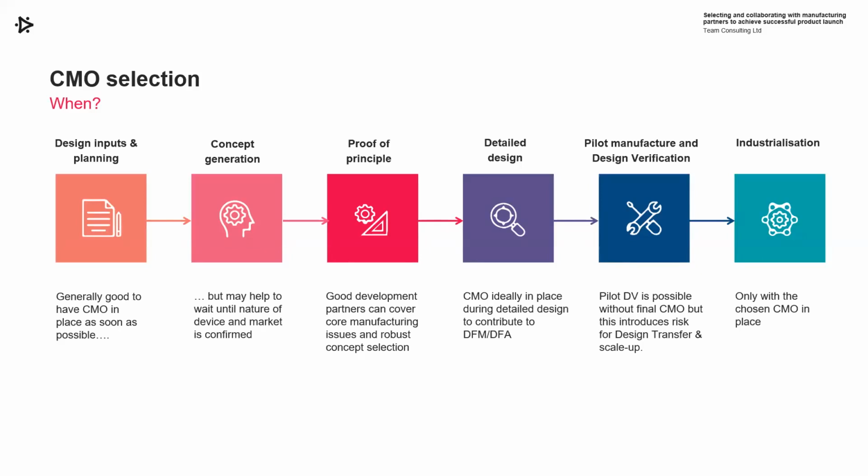Pilot design verification is possible without the final CMO in place. We have done that on projects, but I think it's fair to say it's not ideal. It can introduce risk during design transfer and scale up if you haven't had your CMO involved until after design verification, particularly if any changes are needed. And then obviously industrialisation is only going to happen with the chosen CMO in place.